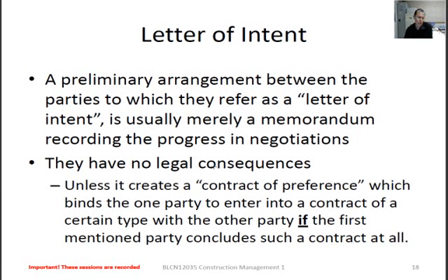Yeah, Morgan, you're almost right there. A letter of award or a notice of award is actually what forms a legally binding contract. So it's more powerful than the letter of intent because it's basically saying we've looked at your offer and we've accepted it, and therefore we've awarded this contract to you, and only the following things are outstanding.